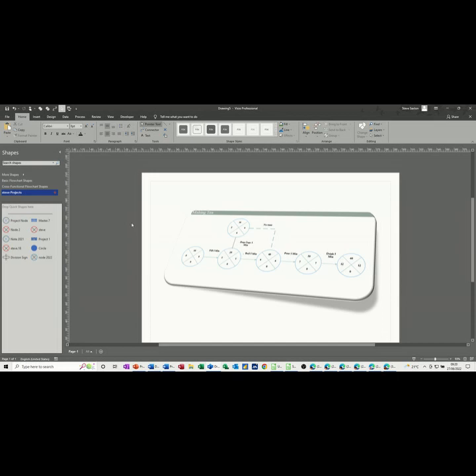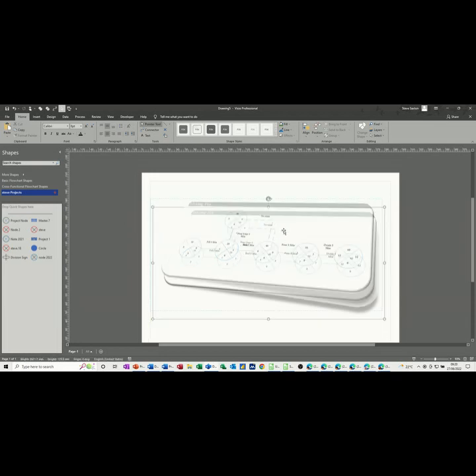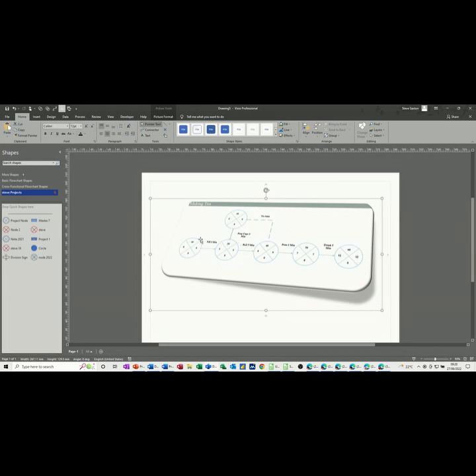In this module, I want to show you how you can use Visio to create a PERT diagram and find a critical path. So on the screen you can see a photograph of what I'm going to recreate in Visio. In these types of diagrams you have an event, which is this bit, and then an activity, and then an event and an activity. And in these numbers, basically the 10s, the 20s, the 30s and 40s are just event numbers. And then what you've got here is the earliest event time and then the latest event time. And then this 0 is the float, which becomes the critical path. So if the float is 0, that is the critical path.